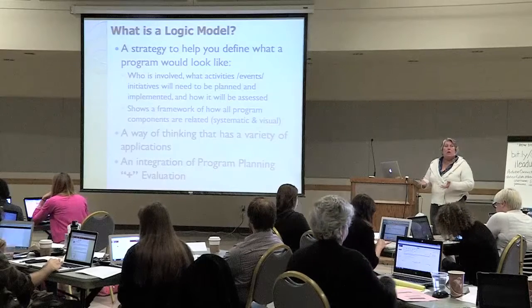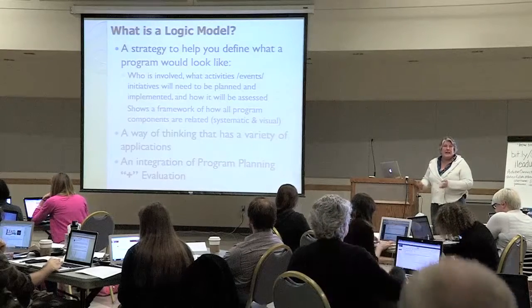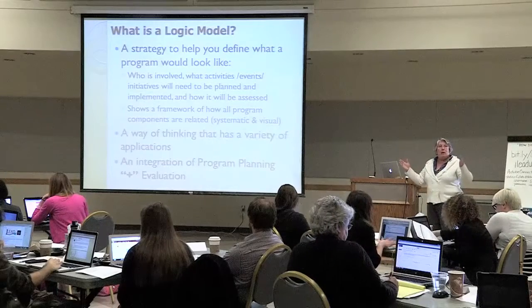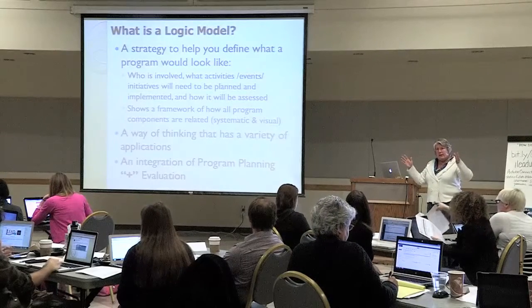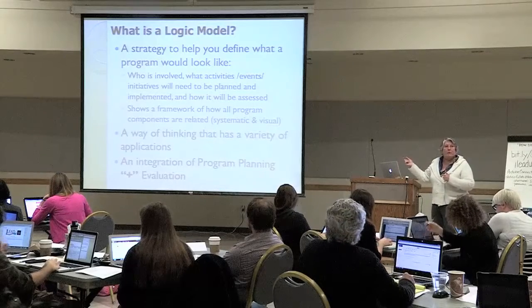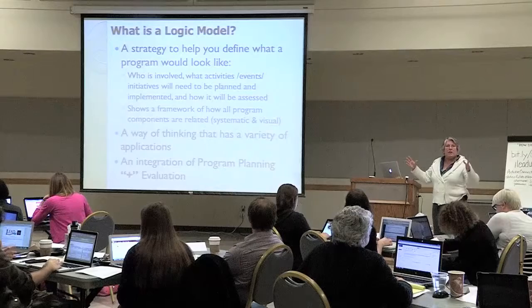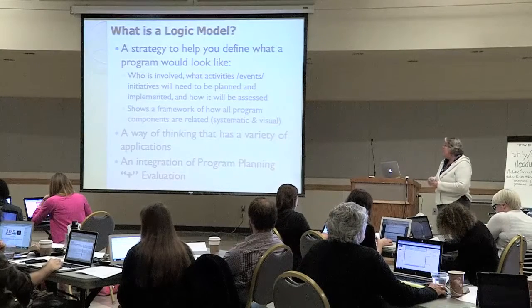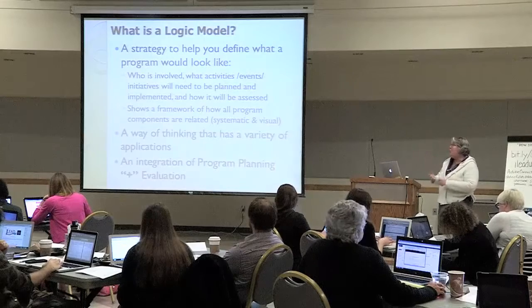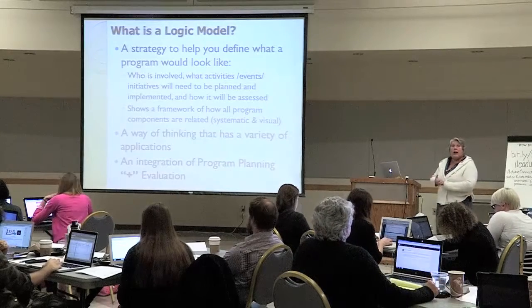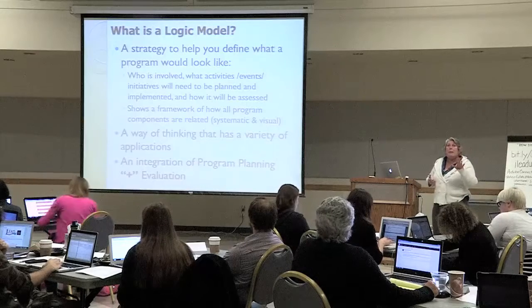I work a lot with faculty on writing grants, and logic models are awesome for grants because it gives an overall vision of what the grant is. People actually put my logic models in their NSF grants when they submit them because they said it gives an overview to the funders on what the project is about. It helps you show who's involved, what activities you need to do, what tasks need to be completed, what your outcomes are, and what your impacts are.